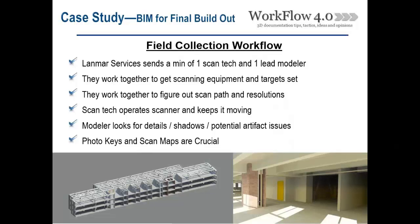The modeler and scan tech should work together to come up with a decent scanning path, doing the full loop as Greg suggested. Talking about resolutions: it's important that the scan tech understands where they need high resolution scanning and where they can turn the resolution down to get an efficient point cloud. This helps speed up the registration process and helps modelers later on — not having everything scanned at uniformly high or low resolution avoids missing things and prevents the computer from running slower.